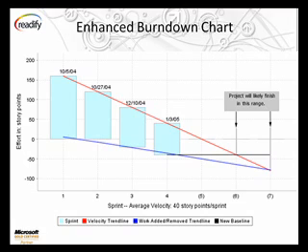What we're doing now is we're tracking how fast we're getting through our scope in terms of the number of points, so that's our velocity. But we're also tracking how much functionality the customer's adding during each iteration. So we're tracking scope increase at the same rate. I've seen projects where the velocity can't keep up with the scope. So you actually have the lines diverging. If you see that situation, you've got something to talk about with the customer. Very gently, very politely. Stop it! At the same time, what you do by doing this is you show the customer visually in a single piece of paper how much money they're costing themselves by changing scope and not reducing scope that they originally had.